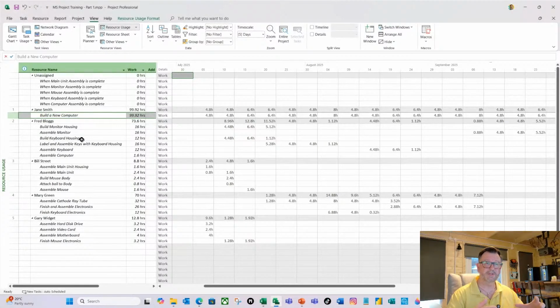And that's because the project manager is ultimately accountable for the delivery of the project. But also, in addition, so is the sponsor. So it's always good practice, I feel, to have at minimum the project manager's name against the milestones. It doesn't impact the allocation because there's zero duration, but it also wouldn't hurt to have the sponsor's name in there as well, because that's the thing that would appear on any type of stakeholder reporting.